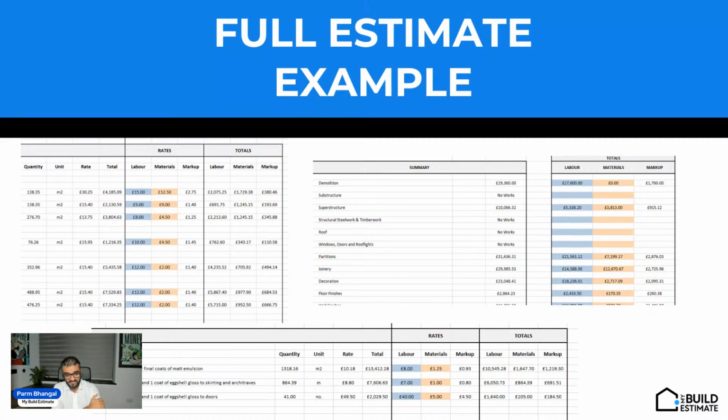So up to, say, the end of November, I know I've spent X on labor, X on material, and the value of work we've completed based on our percentage valuation is X, and this is what we spent. We're actually doing okay so far. Let's keep moving the project forward. Let's keep an eye on our labor. Let's keep an eye on our materials. If you're not doing that, you're waiting to get to the end of the project, and you're effectively waiting to be given an answer that you probably won't like. So that's why effective cost control at every step of the project is key.